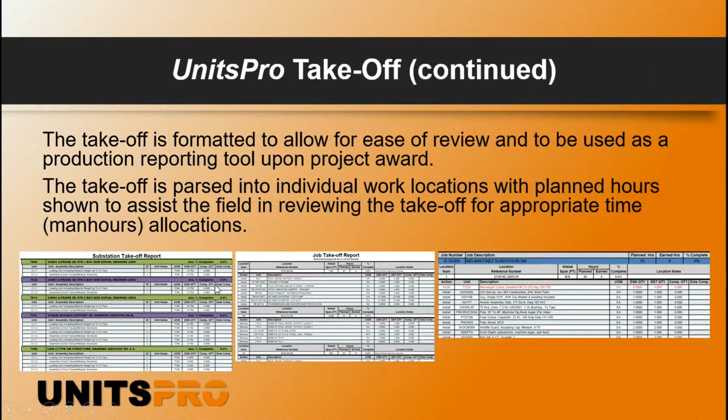So once we have these takeoffs put together, you can see I have some examples here of a substation, a transmission, and a distribution takeoff. We can go through and view what our planned hours are for each location. So our planned hours are showing up here, and this is very valuable for our field folks because what they're going to do now is they're going to use this as their beginning basis.